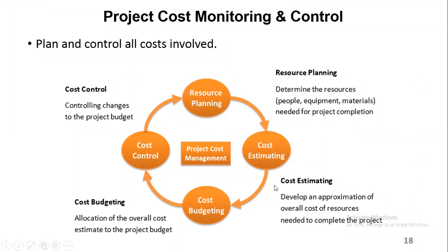And then you also need to do the cost estimation. Because if you have assigned the dollar value to all of them, then with that, it's like you have put up your budget now. You finalize your budget where you have allocated all the other costs, because some of them may not be in the work breakdown structure. And then when you start executing the project, you start controlling those changes now. Like what one of your colleagues explained, you can do it even in Excel.